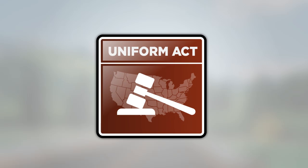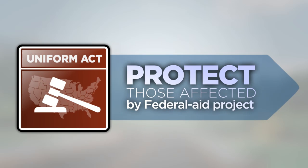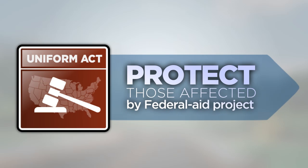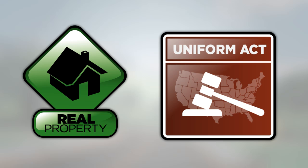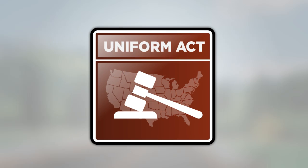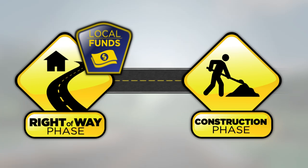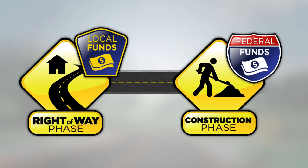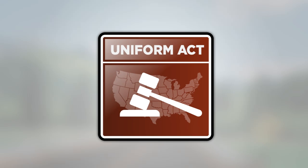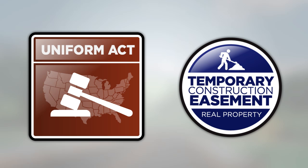The Uniform Act and other Federal right-of-way requirements are in place to protect and treat fairly those who are affected by a Federal-aid project. When you need to acquire property or certain rights or interest to property in order to build your project, you must comply with the Uniform Act. The Uniform Act requirements apply when Federal-aid is used for any phase of a project. For example, if you use local funds only for right-of-way acquisition and plan to use Federal-aid only for the construction phase, you must still comply with the Uniform Act to be eligible to receive these Federal funds. The Uniform Act requirements also apply when only a temporary easement is necessary for constructing a project.